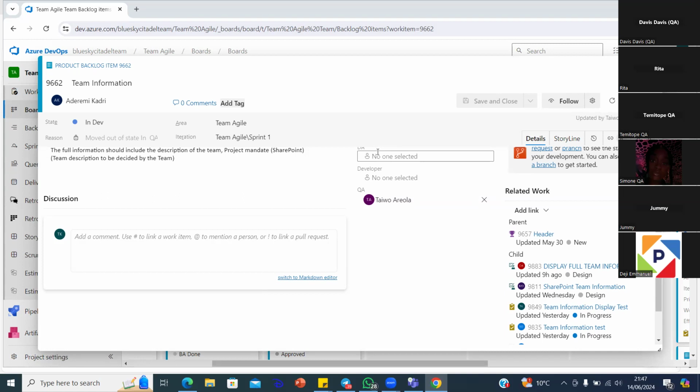So the first approach is that the bug and the story, or the PBI, would have their own life cycle, right? So you have a story. The story is in QA, because that's where you actually find the bug, right? So then you create a bug at the back of that story. The story will still remain in QA, and the bug will be created. But you have to determine or establish where to put the bug, right?